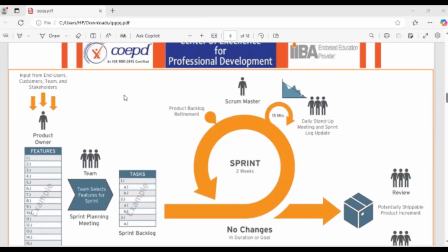First of all, they will plan the sprint. A sprint is an iterative, time-boxed duration to develop a number of user stories. That is called a sprint. A sprint can be 2 weeks to 1 month, 2 weeks to 4 weeks, depending on the organization that is going to run or develop that sprint, depending on the company.